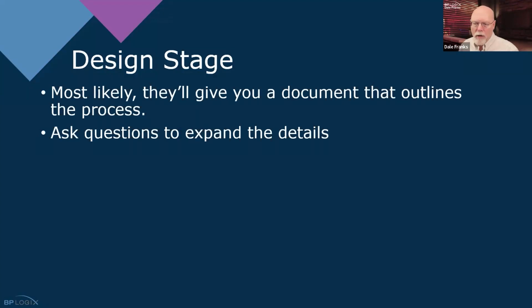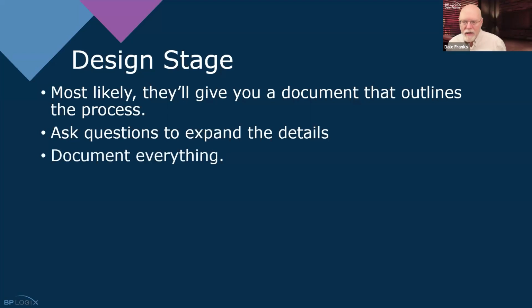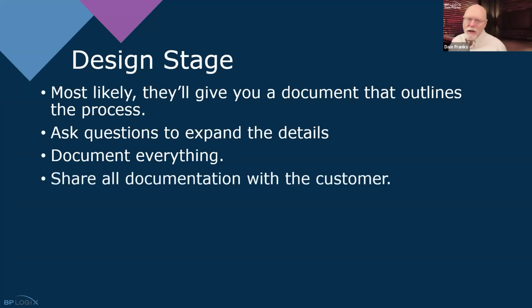about how this thing works. And I am going to probably have to ask these questions continuously and iteratively so that they can explain the details. And every time I ask them a question, I need a written response. And I need to document that into a general application requirements document. And I need to share that document with the customer.